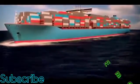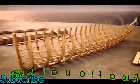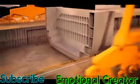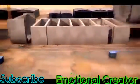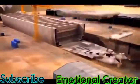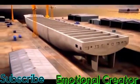To assemble the hull as fast as possible, Peter's team is using an ingenious technique. In the past, ships were built from the bottom up, a bit like building a house. But this method was extremely slow. So workers are building the Triple E's hull from end to end, using 24 prefabricated sections called mega blocks that are welded together.